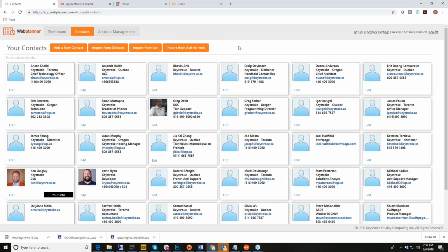But I honestly believe that project management really works hand in glove with CRM. Because CRM, just from a calendar standpoint, works entirely differently, based on appointments, slots into calendars, things like that, whereas project management typically works in ranges. Okay, so a much different scheduling system. So it's very difficult to use one for both.